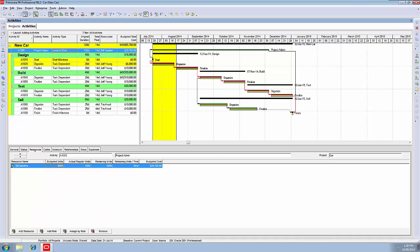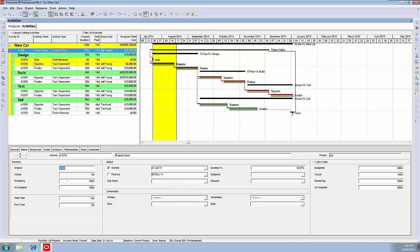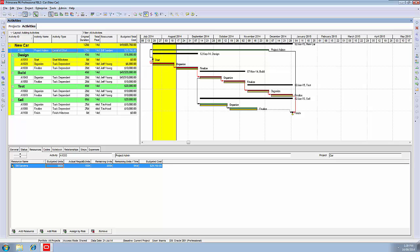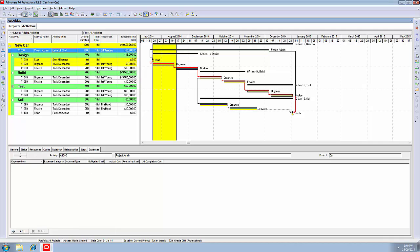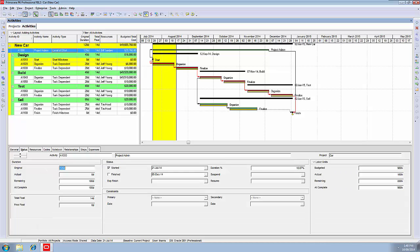Now we do the resources for our level of effort project admin. Notice that the computer has put in figures from the data that we've just put in. We said 100 days remaining, which meant 20 days had been done. Let's put in actual regular hours of 160 - 20 days at 8 hours a day, 160 hours. Now, it may be the case that our resource didn't work at 160, in which case we change that. However, in this instance, we'll assume that that is correct. No need to change anything. Expenses - no expenses in this particular one.